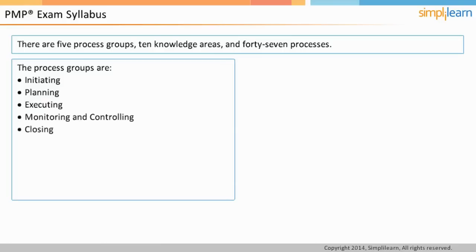Project execution and monitoring and controlling processes go hand in hand. When a new project is initiated, all processes of the project initiation process group should be applied. Similarly, when the project is being closed, all processes of the project closing group should be applied. For instance, identify risks is a process of the project planning group, so when the project is in planning phase, you must identify all the risks of the project.